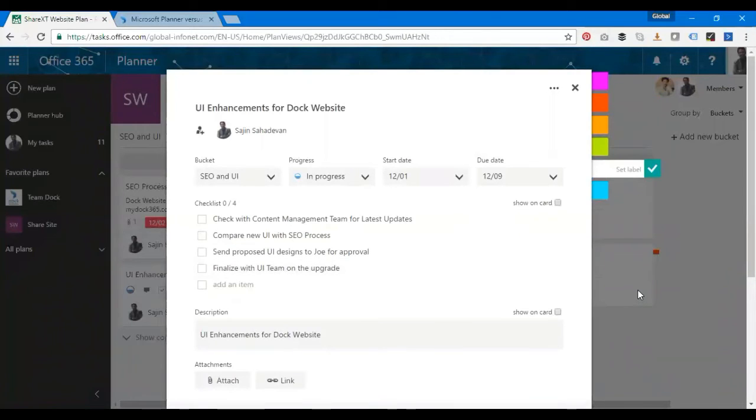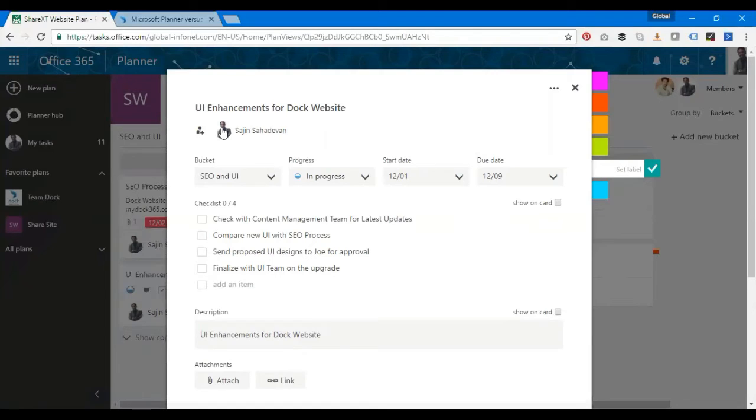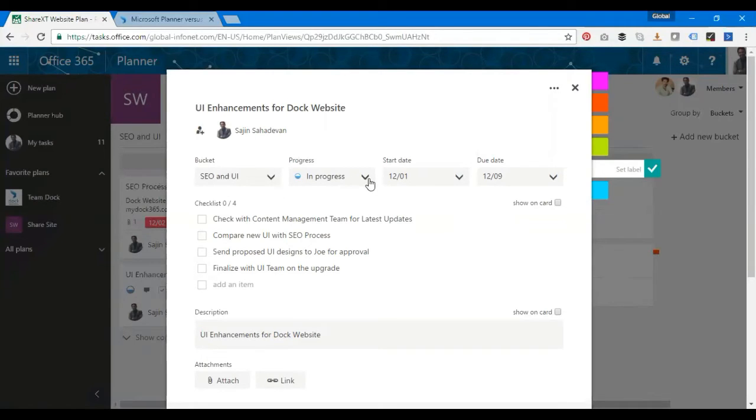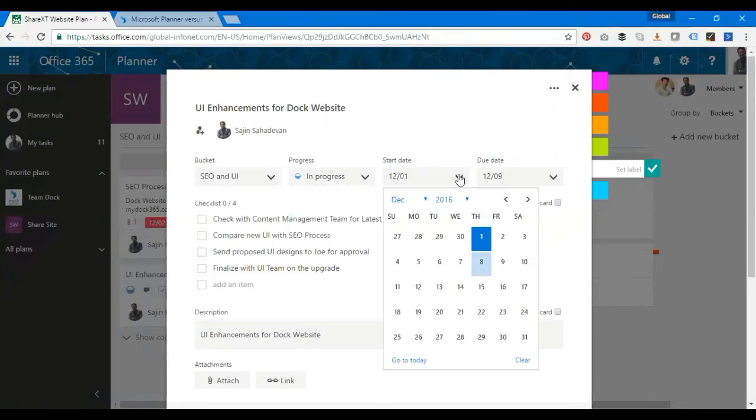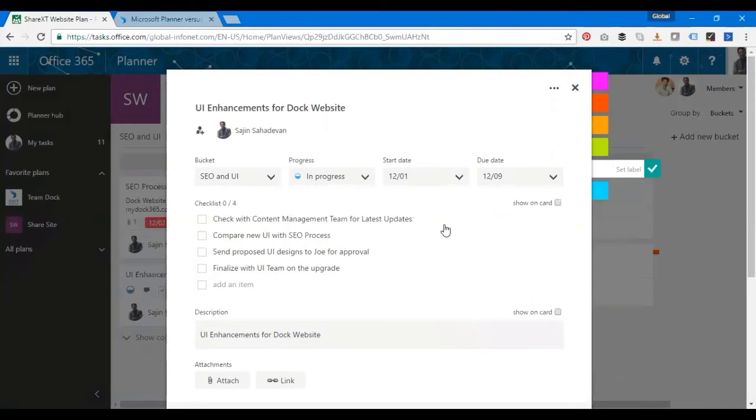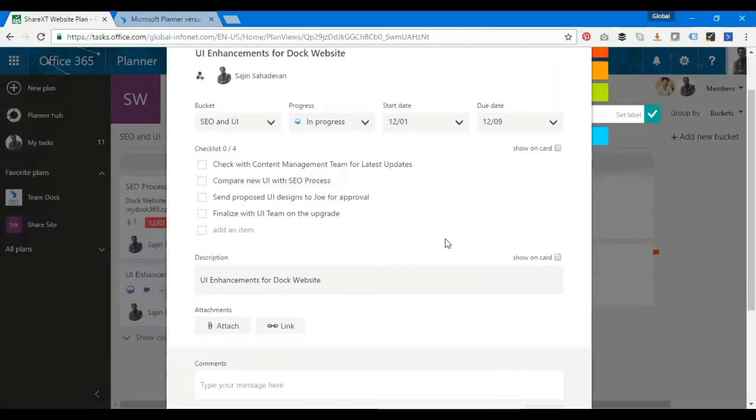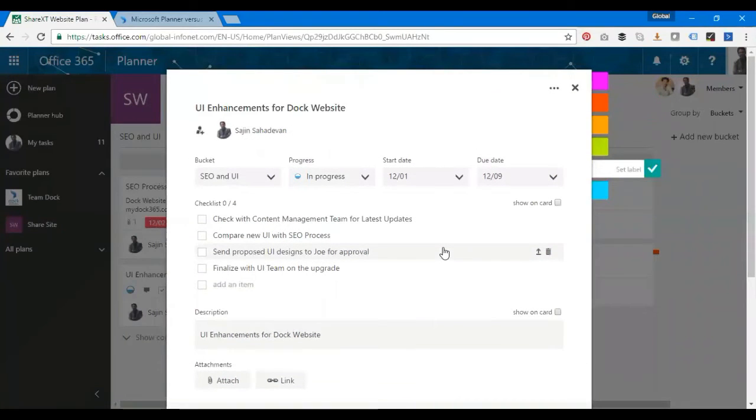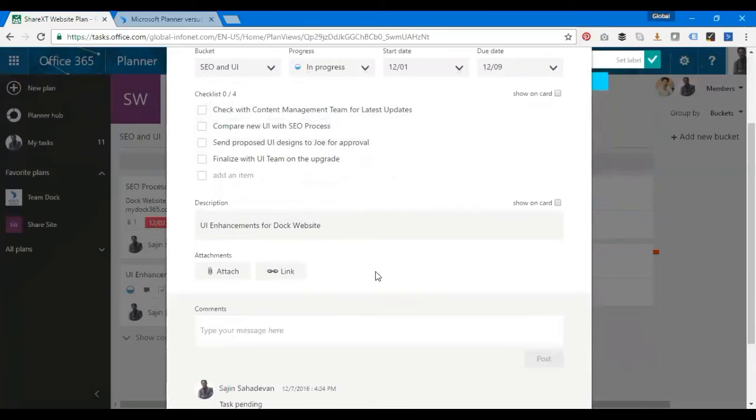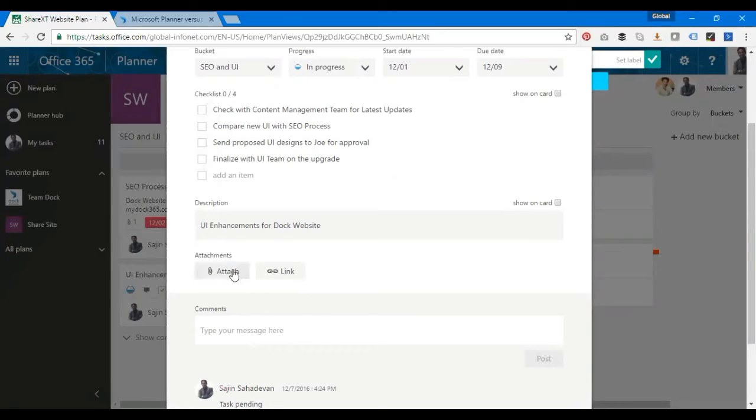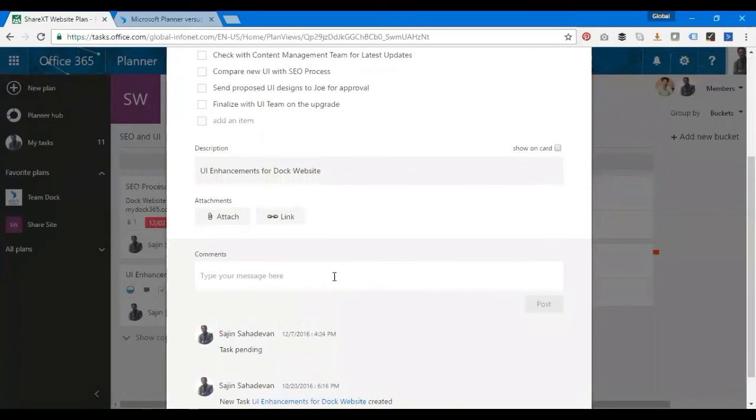I've created an example. This is one of the tasks. That's me, the assigned person. You have the bucket it belongs to, the progress status with Not Started, In Progress, and Completed, the start date and due date. I have subtasks or checklist. I'll use this checklist as my subtasks. Once it's done, I click here and that's it. I have a space for description and can attach files from OneDrive and SharePoint and put a link.